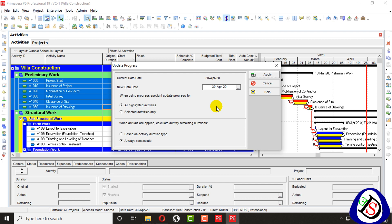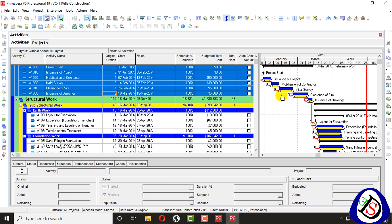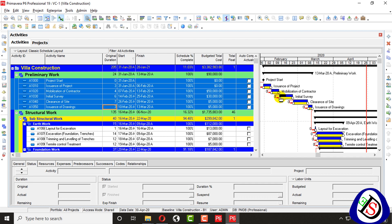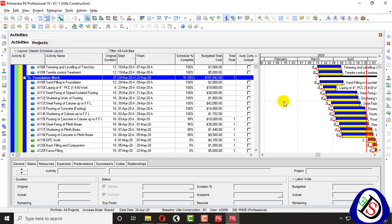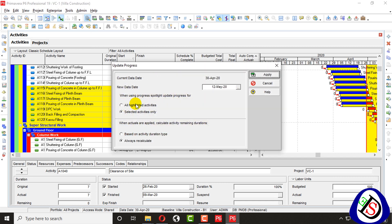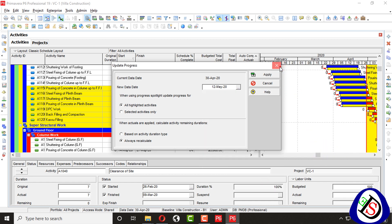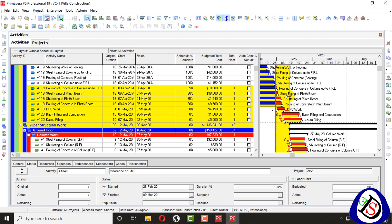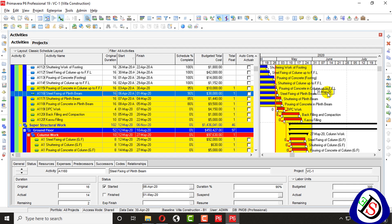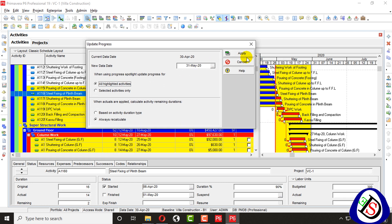I selected 'not selected activities only' — apply. You can see these activities are now updated. If you highlight activities, for example you highlight these activities, you go to Tools > Update Progress and apply highlighted activities. It updates up to the new data date.